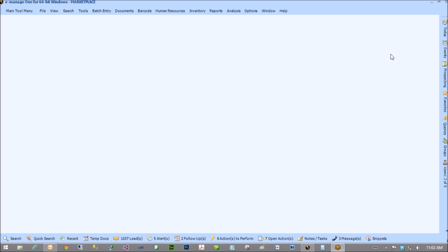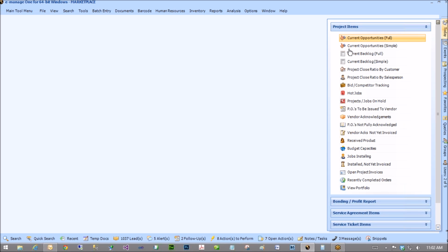We made a recent change to the today and the current backlog so that your zero orders will show up on your backlog and also show up on your to-be schedules. So if you create an order that has no line items on it because you just want to be able to install it, then you can create a new order, just give it an order book date of whenever the punch list is, and it'll show up on your current backlog until it's completed.